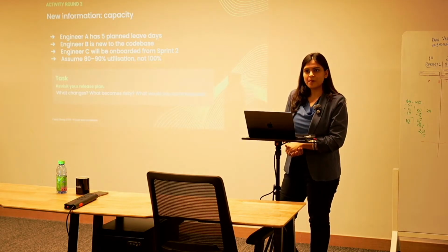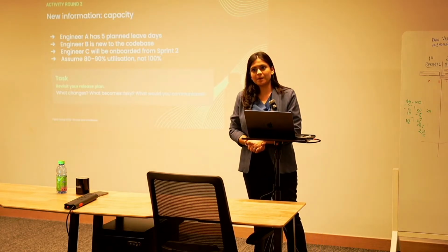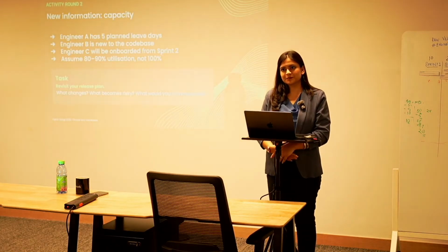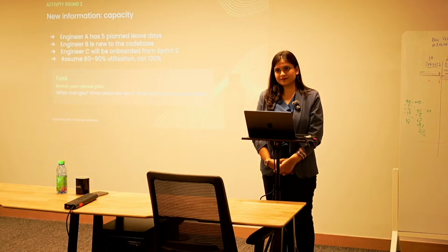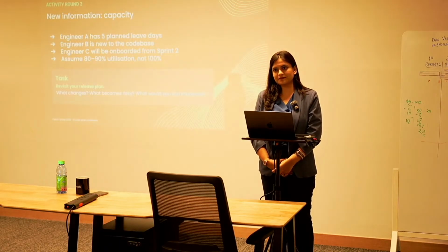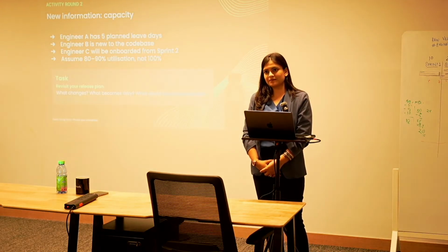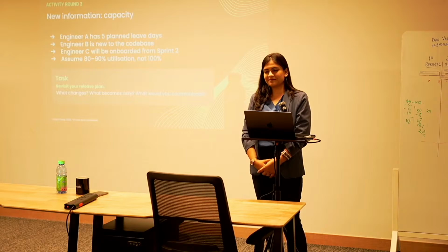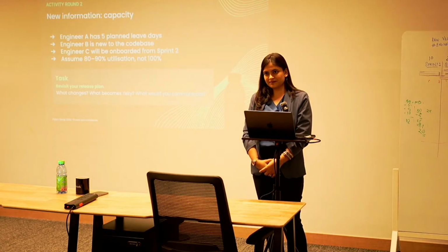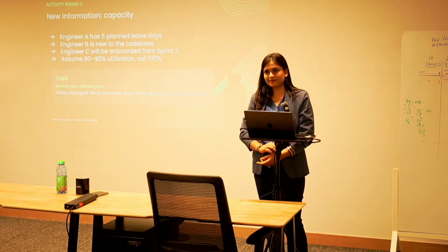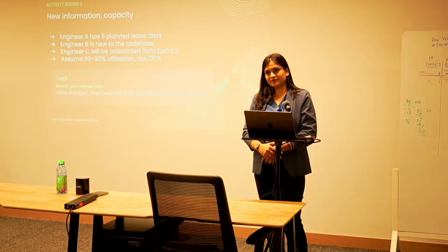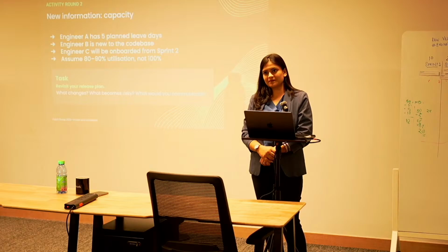So one thing that I learned while estimating a sprint rate, the number of stories that you can cover, is that you need to be very realistic in terms of the capacity that you have. We consider about 80% of a person's capacity. For a new person, we consider around 50% of their capacity. Those kinds of things give you a more realistic number.